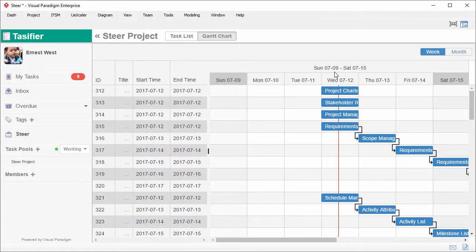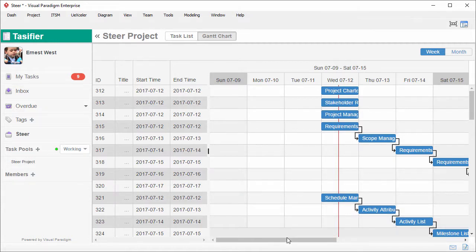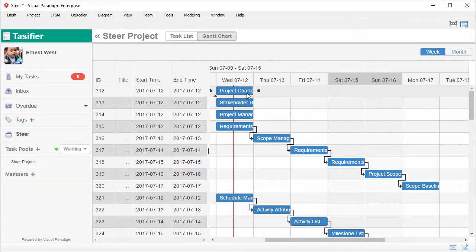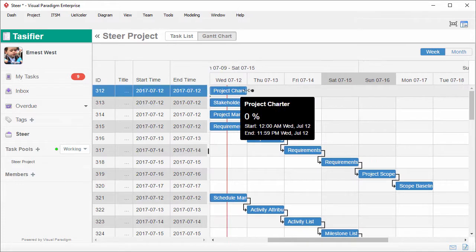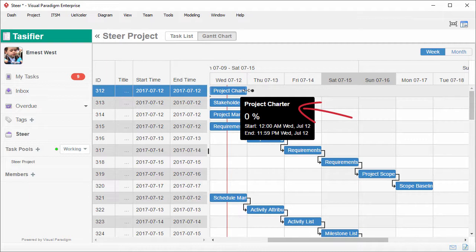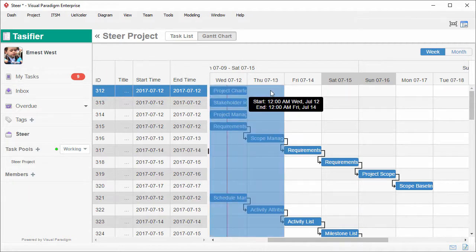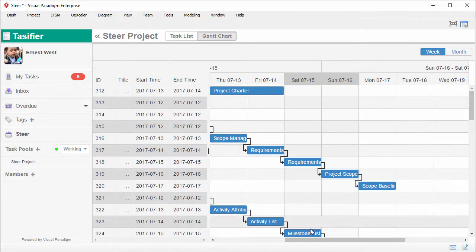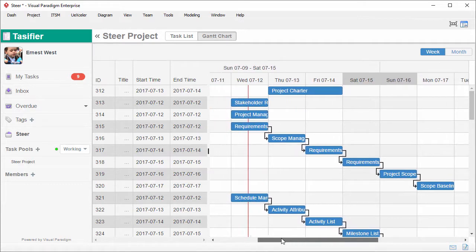This is Taskfire, the task management interface. It's presenting the Gantt chart of the project. Each row in the Gantt chart corresponds to a work item in the just-in-time process. You see this one, the project charter? Adjust the planned start and end dates of the tasks by dragging the bars.